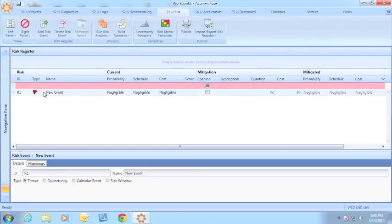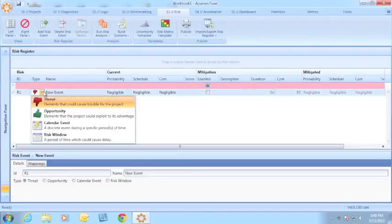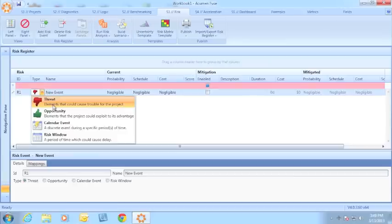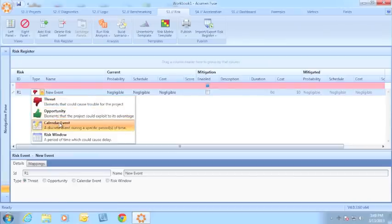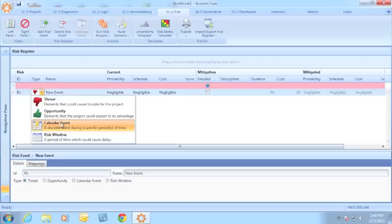Previously, you were limited to the option of adding threats or opportunities as risk events. We've now allowed you to include weather modeling or calendar event or risk window modeling to your risk analysis.